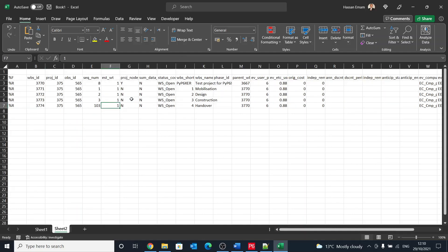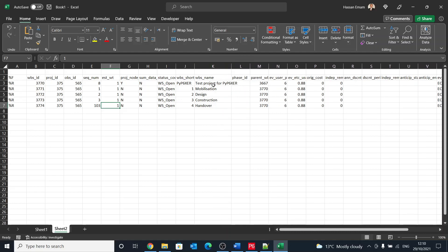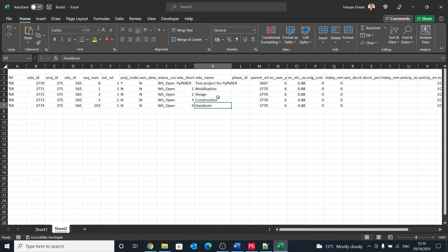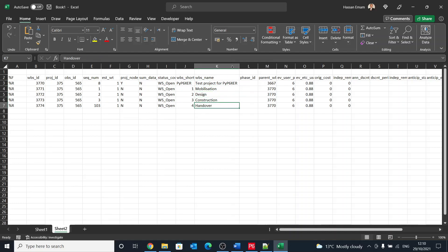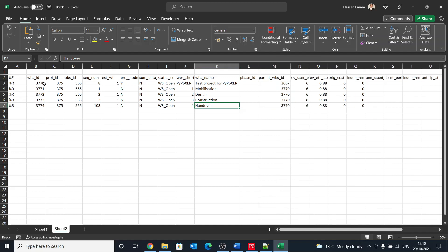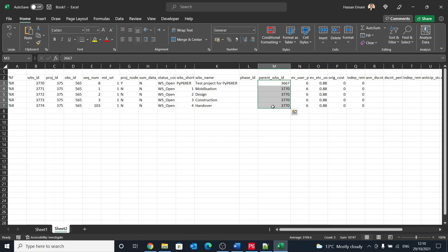Here we go. So basically these are the WBS names. You can see I have test project, mobilization, design, construction, handover. But it's not only that. We have here an ID and we have here WBS parent ID.